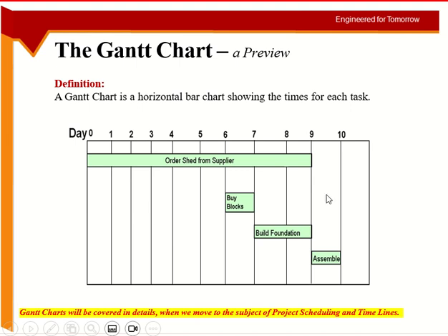In this scenario, keep it in mind, the buying is very timely, because immediately after the buying you are starting the building. So you don't need to take care of the blocks which are just lying on your site. We don't want to buy things too early and then store them properly for 1 week.